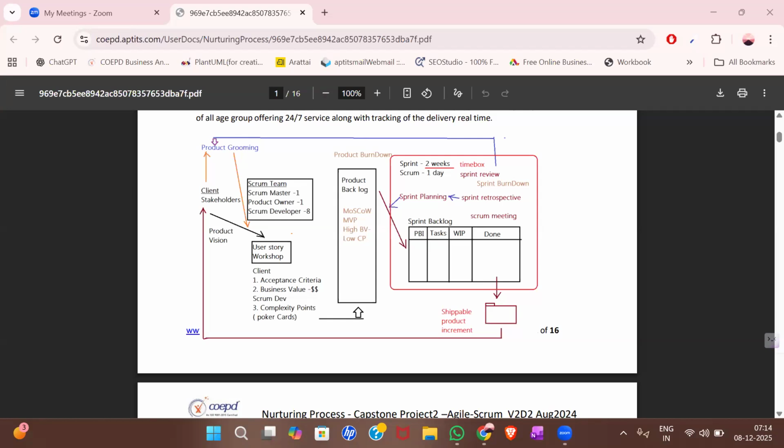For the feature where restaurants can sign up to their account, a restaurant creating their account on the app is very important, because without restaurants, even if you created login details, feedback and everything, it doesn't provide that much financial help, right? So the restaurant sign up feature is very important financially for us, in the sense for the client. So that user story will have the highest BV value.